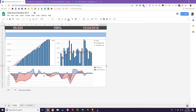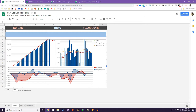The bottom graph is the daily difference track. On the mean of 1,667 words per day — when I'm behind, the blue line goes below zero. Zero here represents the yellow line on this graph, so if the blue line is above that it means I wrote more than I needed to for that day. The red line shows where I am relative to where I need to be by the end: if the red line is above the line it means I'm ahead of schedule for the whole project, not just for that day. It definitely makes sense when you're in the thick of it.